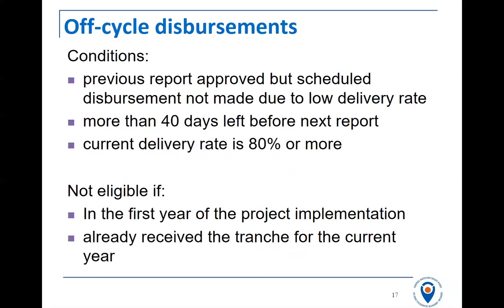But there are certain rules. You would have to have more than 40 days left before the next report. If it was 40 days before the next report was due, we would just ask you to wait until the next report, just to save everybody paperwork. And obviously, you always have to spend that 80%.